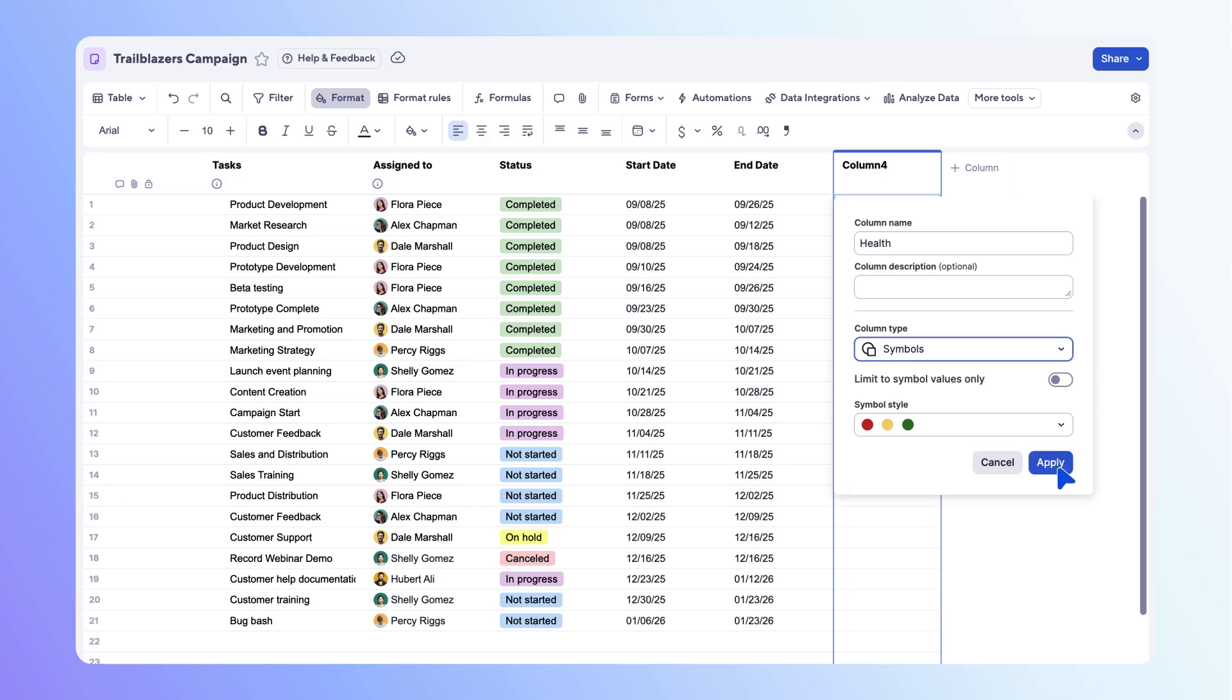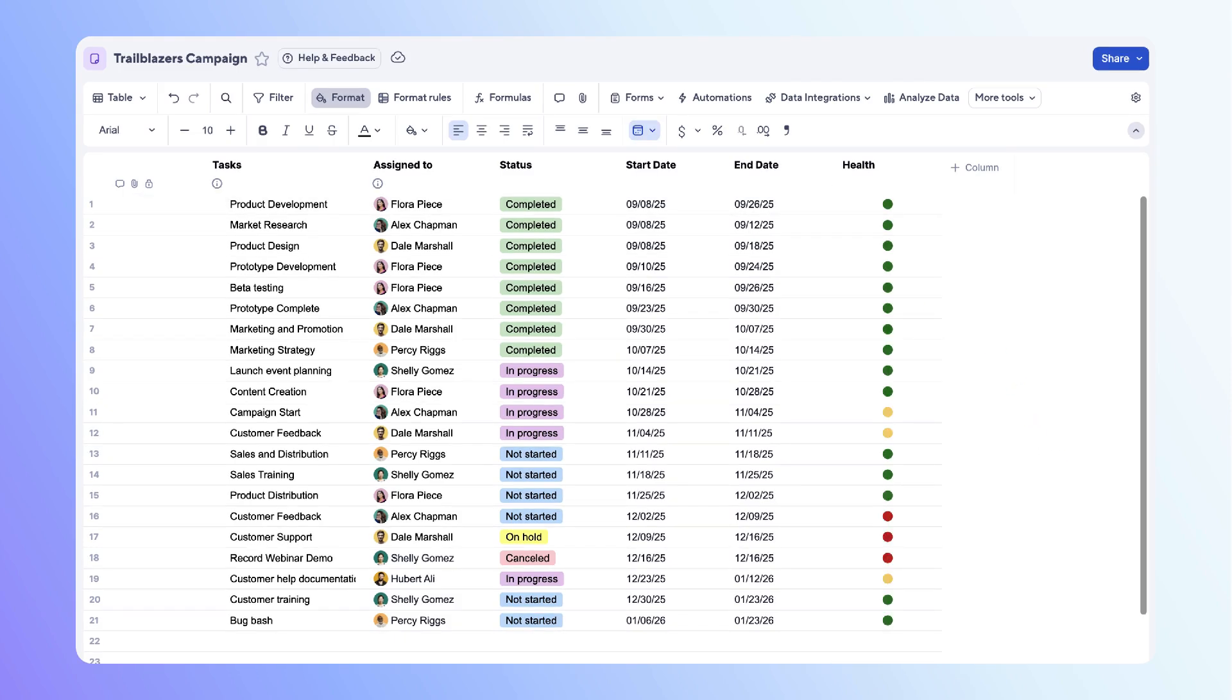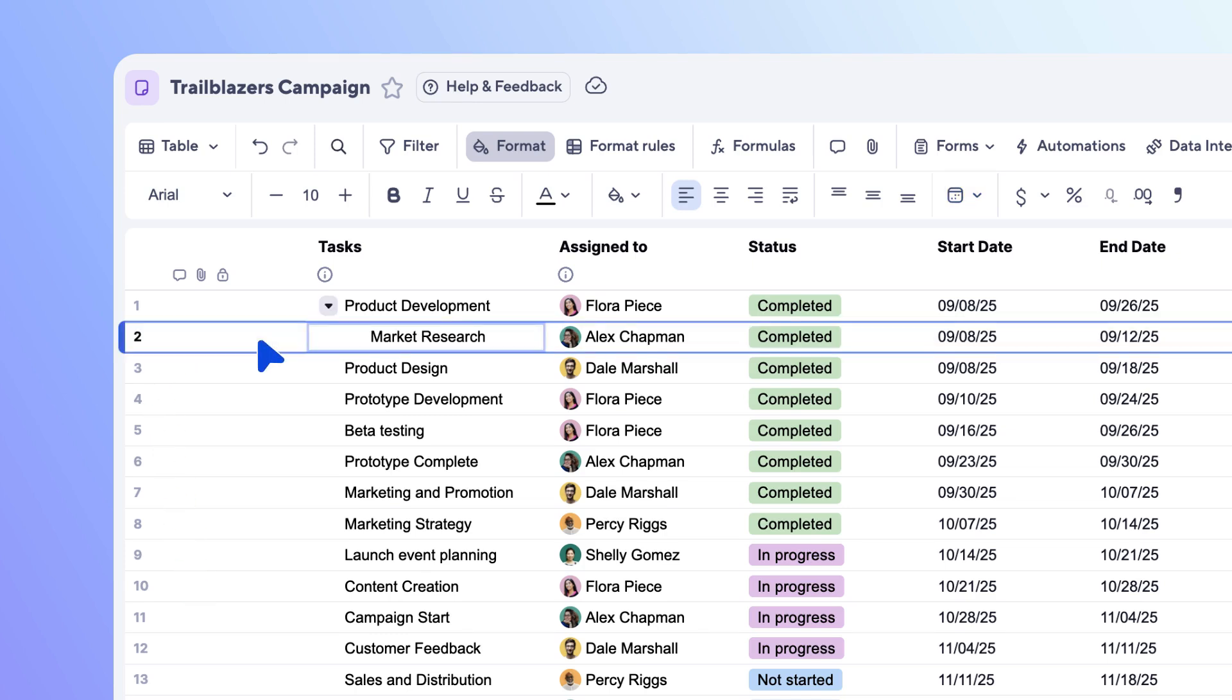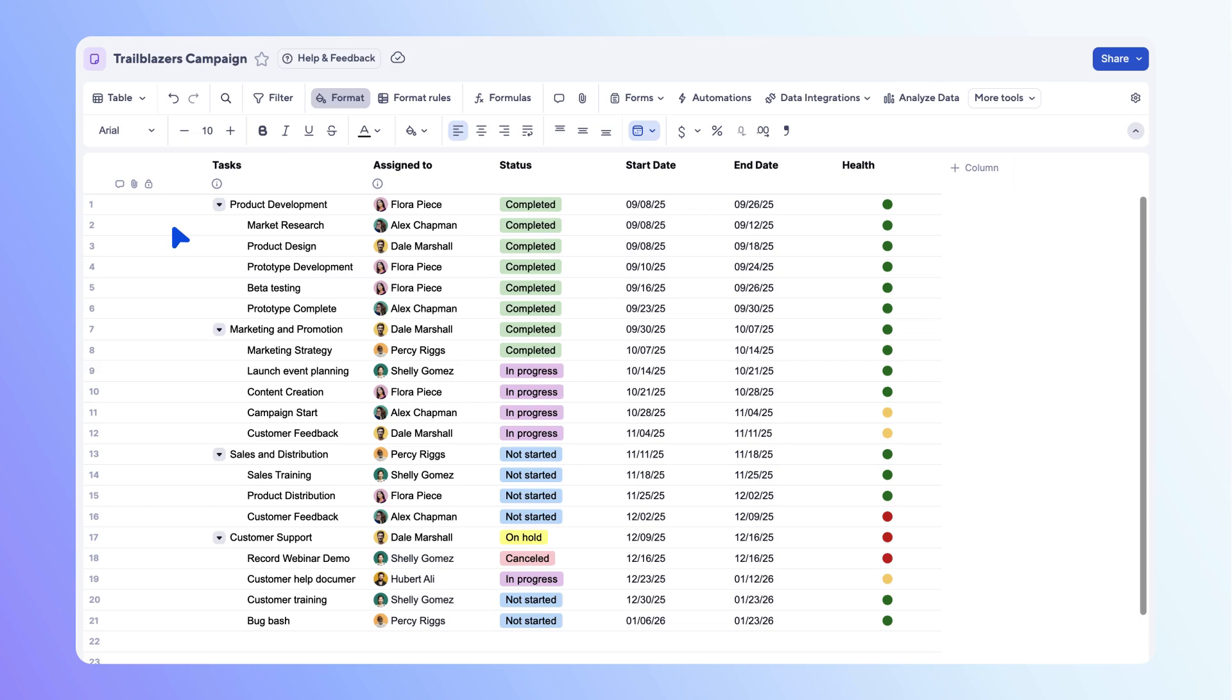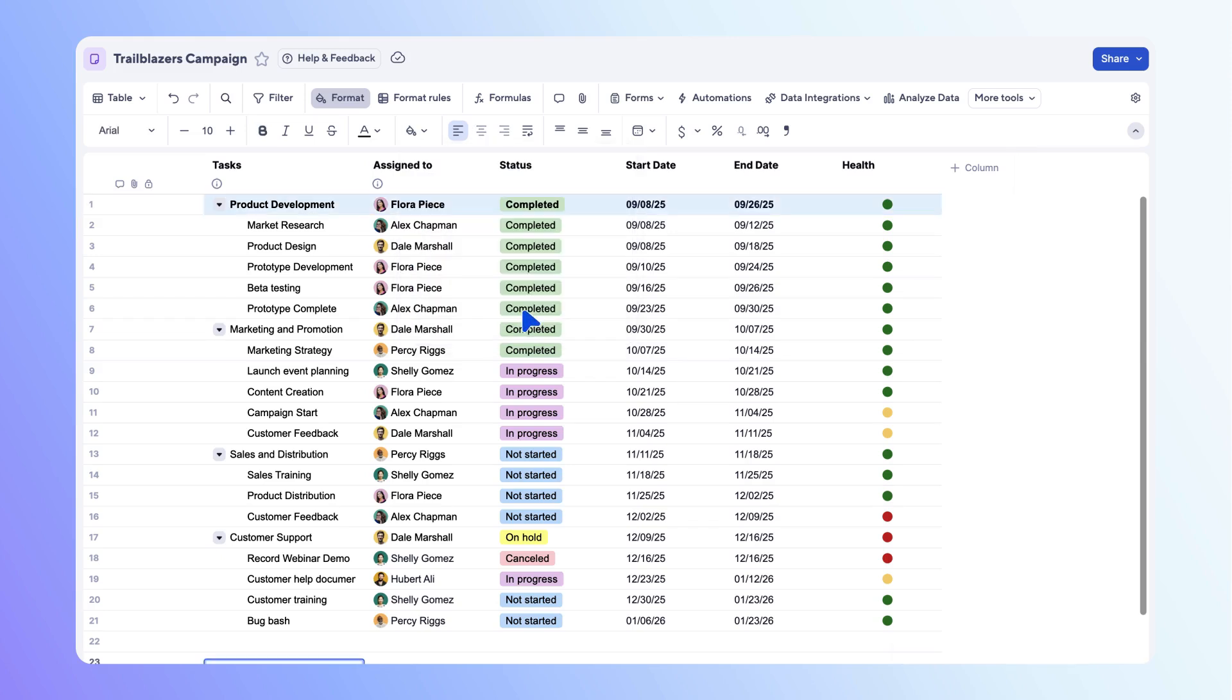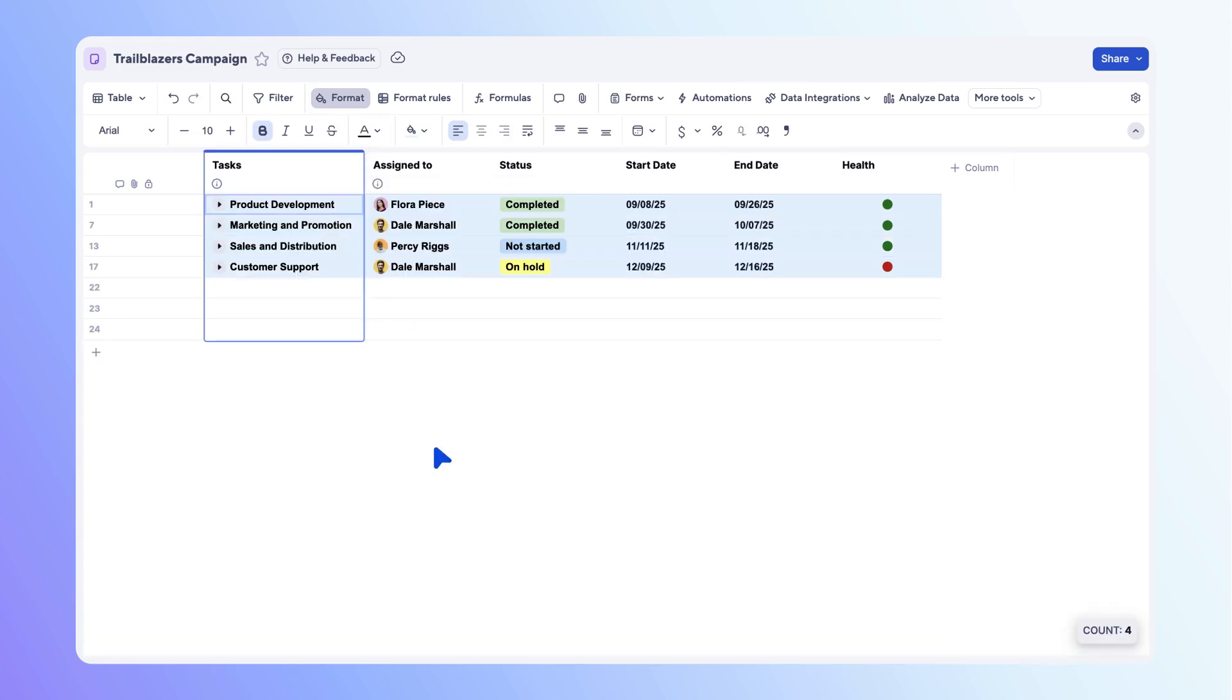With the columns ready, let's format rows. You can make some rows parent tasks by selecting a subtask and using the arrow to indent it as a child row. Repeat this for all other subtasks. Then you can add other formatting to parent rows, such as bolding the text and applying a shaded background. Also, you can use the column options menu to quickly expand or collapse all hierarchy. Now you have a quick view at only the high-level parent tasks.